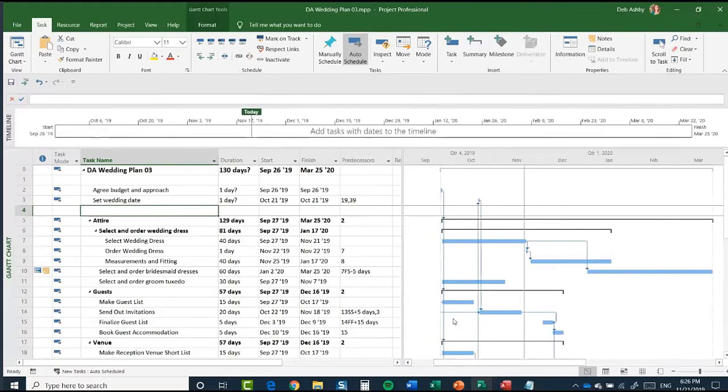What I'm going to move on to talking about now is milestones. And again, milestones are used to denote significant points or events in a project. And a milestone in general has a 0 duration. So it doesn't have a 1, 2, 3 day duration. It can do, but in general, milestones are just a 0 duration marker denoting a significant point in the project.